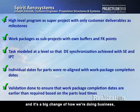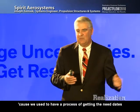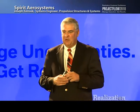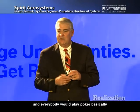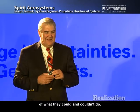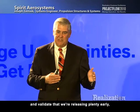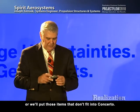And it's a big change of how we're doing business, because we used to have a process of getting the need dates and what the engineers would offer, and then we would negotiate. We'd go into a room for about a week, and everybody would play poker, basically, of what they could and couldn't do. But now we just need those need dates and validate that we're releasing plenty early, or we'll put those items that don't fit into Concerto.